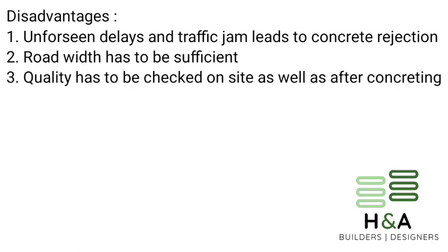And next we can talk about disadvantages of RMC. We have to deploy more laborers to level the concrete, as the concrete pumps will keep on dumping concrete back to back, and to avoid concrete load at one place we have to deploy more laborers to level the concrete immediately. And next point is unforeseen delays and traffic jams lead to concrete rejection. And the next point is that a very efficient and effective transport system has to be maintained before planning the concrete. And the next point is quality has to be checked at site as per standard on fresh concrete,